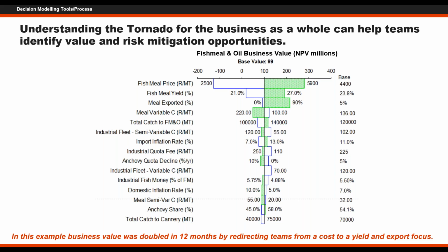We want to quantify it. Quantification doesn't really add precision when you make it in terms of ranges and uncertainties. It's just stretching them wide enough that you really capture 80% of the actual events in your 10-90 range. And when you get to low probability, high consequence events, you really have to go and work. There's a whole methodology that has been developed for nuclear accidents and nuclear reactors, and really, that was the early part of this application.